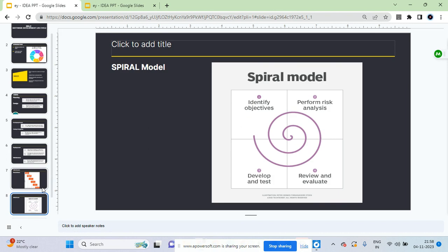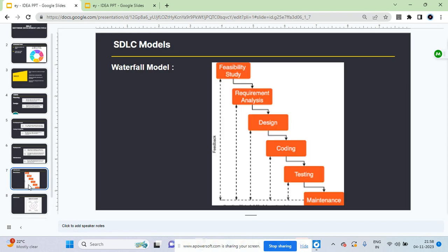Let's discuss the pros and cons of waterfall. It provides a discipline and gives a tangible output at the end of each phase. There is little room for change once the phase is completed. So changes can affect the software delivery time, cost, or quality. Therefore, this model is mostly suitable for a small software development project where tasks are easy to arrange and manage.